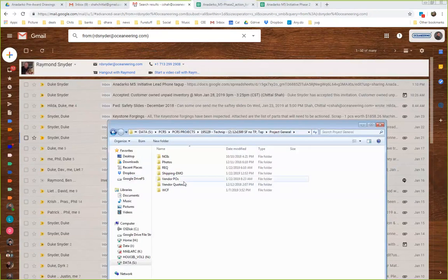So we talked about this. Their function is mainly buying parts and making sure that tracking sheet is up to date. So you as a PM know when you can build it. What's the cost done on the project so far? Like, all these parts are ordered. It's costing me $3,000. I have $55,000 worth of parts still left. Right? So open POs is what you want to look at. So when you do your financials, that sheet becomes helpful to you.